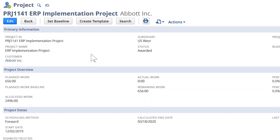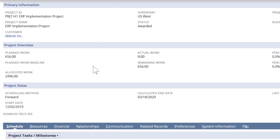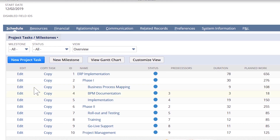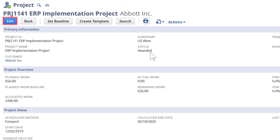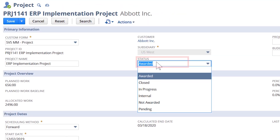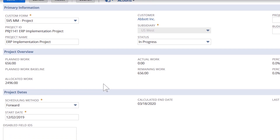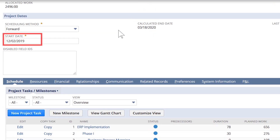Once I am in the project, I can see the information that was populated by the project template. The template automatically pulls in tasks, milestones, generic resources, and billing information. First thing I'll do is mark this project as in progress since I am going to start assigning some resources and the start date is this week.